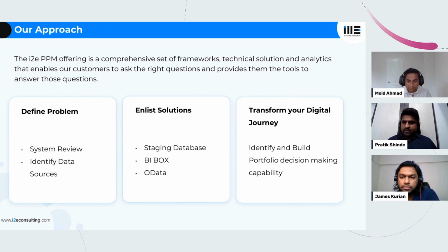First is the staging database, like Mohit mentioned previously. It's nothing but the data from the different applications, not just Planisware but all the external third-party applications, usually exported on a nightly basis to a staging environment. We have all the data in one place, and we simply connect our reporting tools to this staging database, and we can design reports, playing with the data from different organizations.